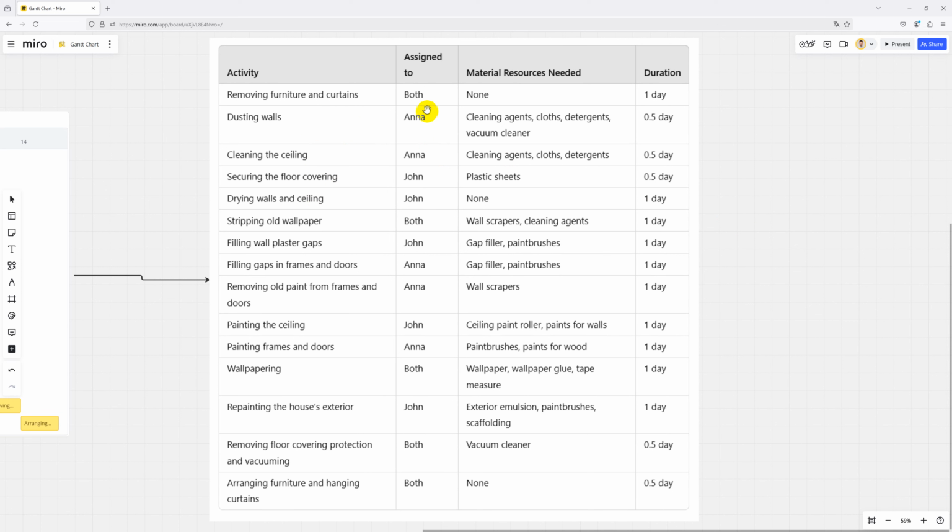But you have to assign also the workforce. We have 2 people that can work, Anna and John, but they cannot do some jobs parallelly, so I cannot engage 2 people in one activity while one is engaged in another activity. So I need to check if Anna or John is available at the time that I want to plan the activity.